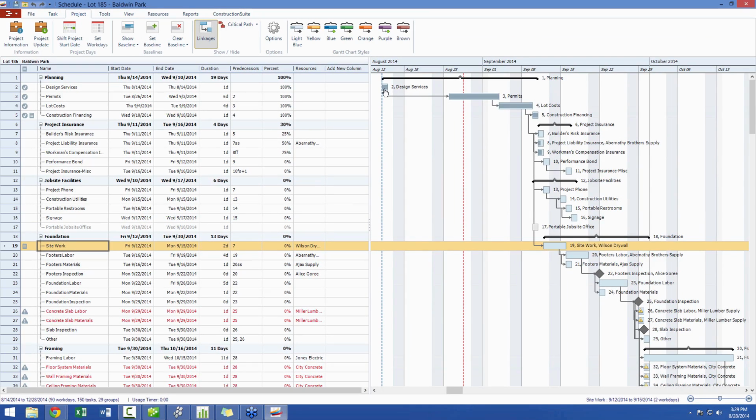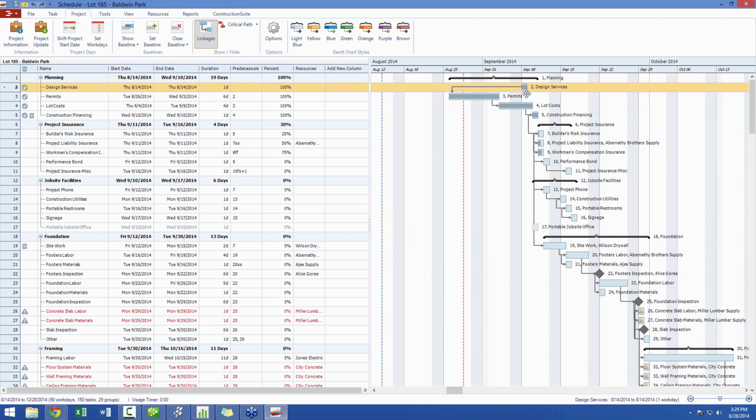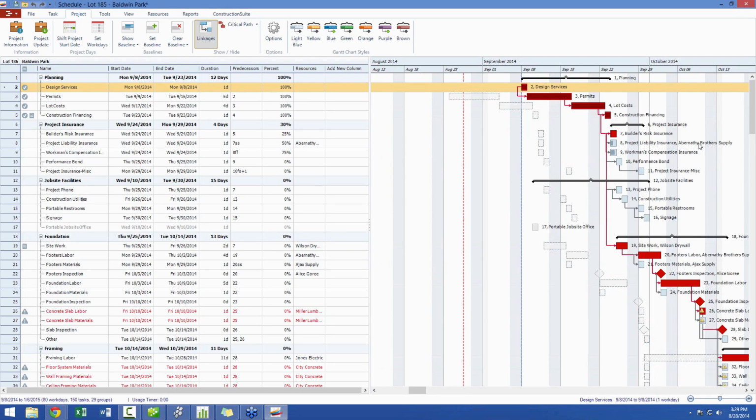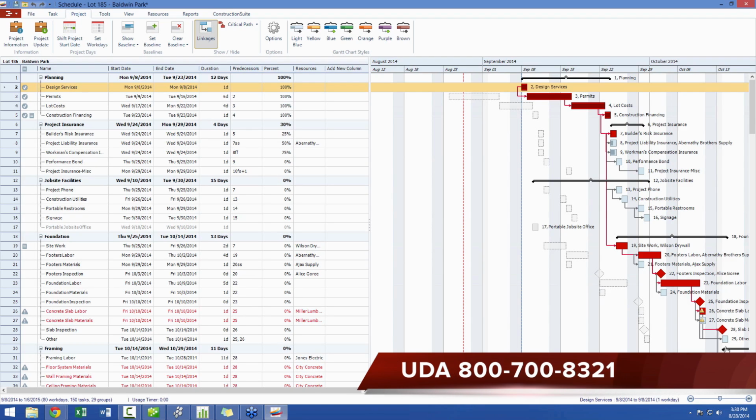And now let's update some of the tasks in the schedule itself. Let's say that we have to delay this out for a few weeks. And everything else maps forward, and you can actually see where the critical path is now updated itself, which is good. But as you go through and notice, you'll also see some of these after images of where the tasks used to be. And this is because we've got that baseline set, and it's currently the baseline that we're showing.